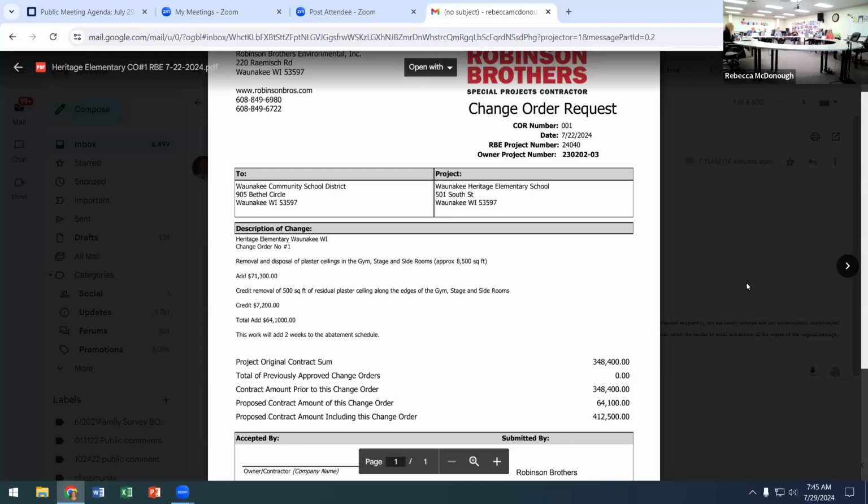So the focus of those is change order 2. How do you create an environment so that this doesn't go like the gym? When you have transite pipe buried in the ground like this, the protocols for the DNR are simply a regulated area, which means barrier tape and warning signs.